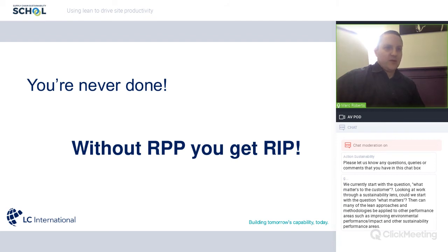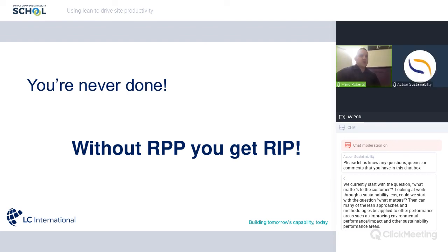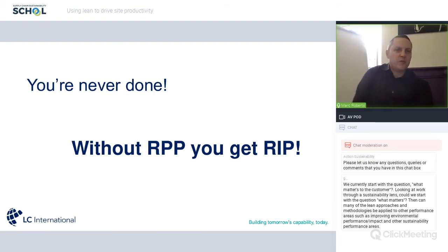Right. So I've gone through some key aspects on that. Just to summarize. First off, step one, when we're looking at productivity, is let's understand what it is and what it isn't. There's a number of measures that are important. The PPC is a great measure, but it is just measuring how much fuel we've got in the tank. To measure productivity, we need to be looking at what input we're putting in on the job to deliver the output that we want. And so typically units per person per day, as an example, is a good measure. But deploying that where appropriate.